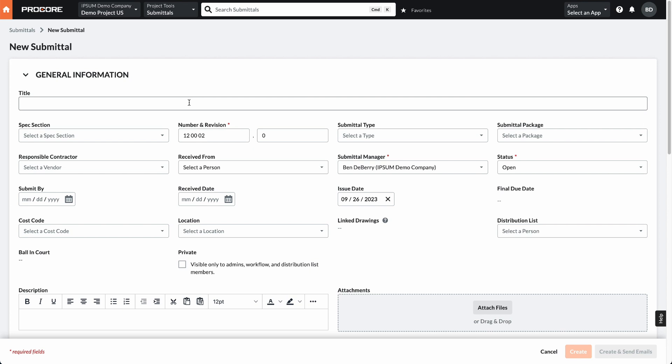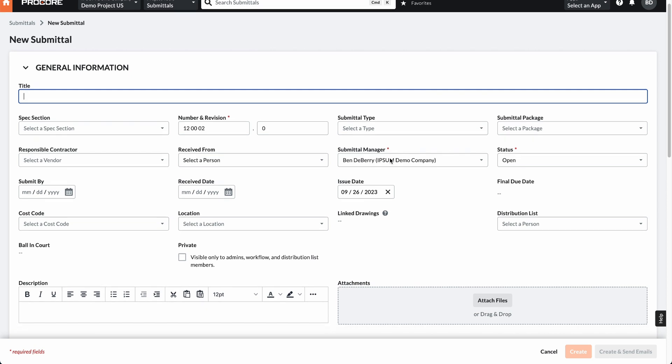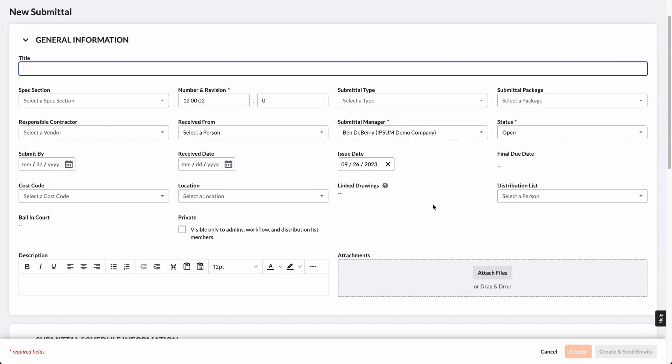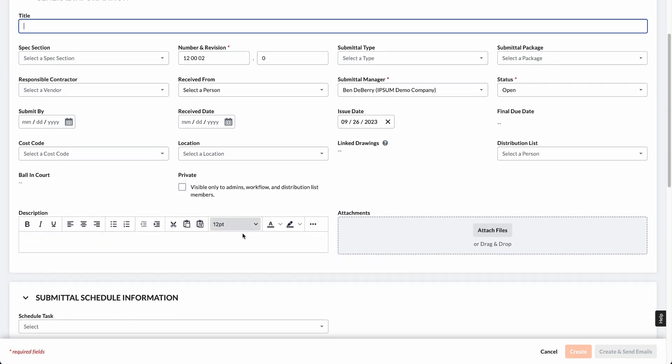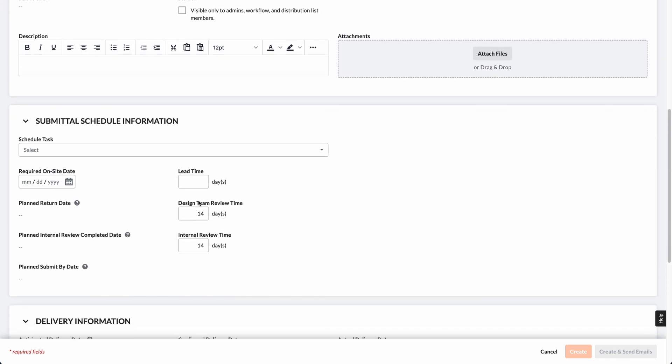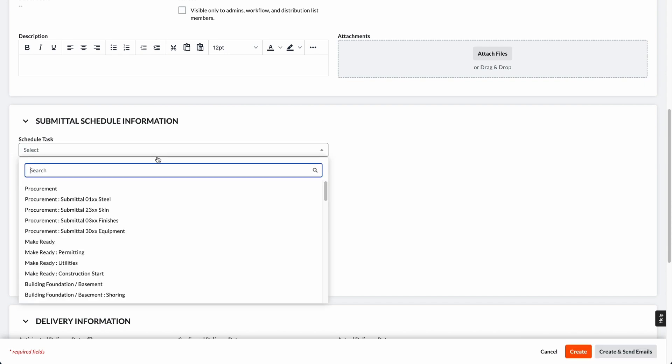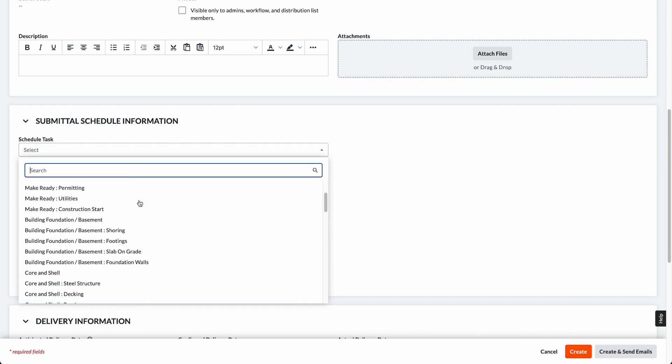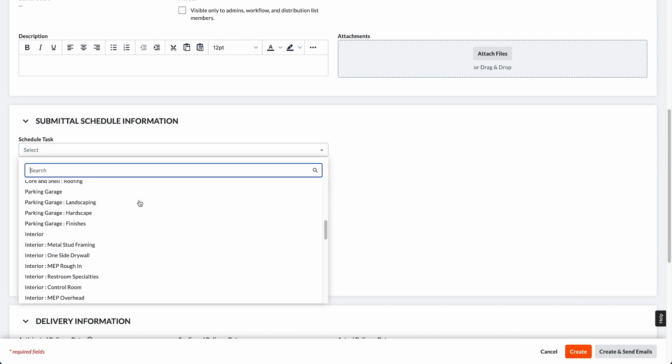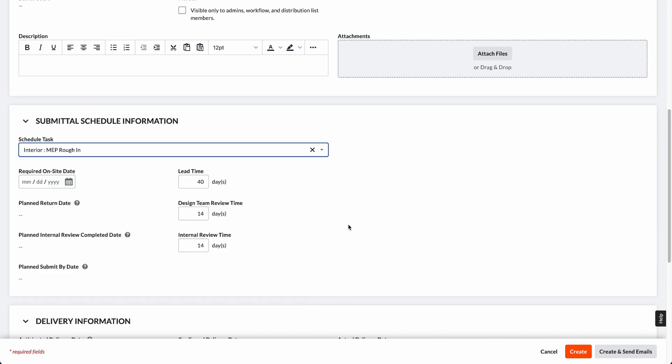In my submittal page, I will be able to fill in all of the pertinent information. The most important for us at Outbuild is simply a title for that submittal, a lead time, and then the ability to track that submittal on a task in your schedule. So again, I can put in lead time. I can use this dropdown to view the scheduled items and select one to connect it to and create that submittal.